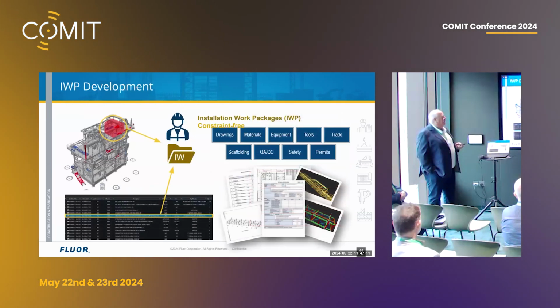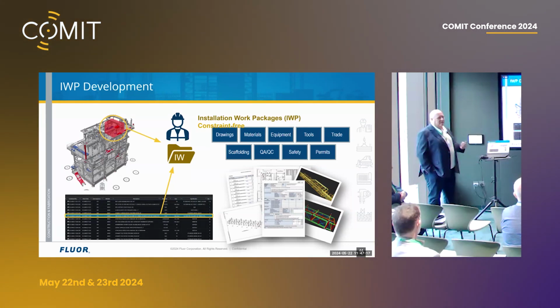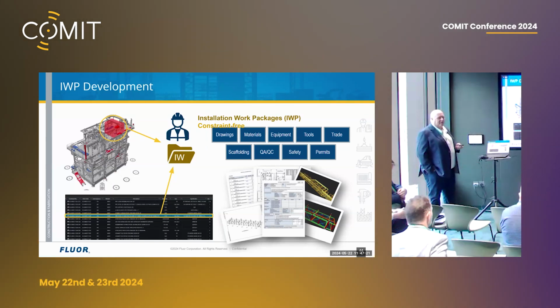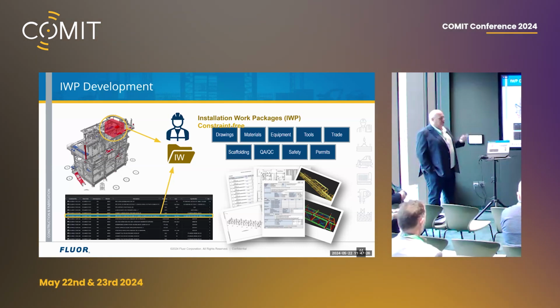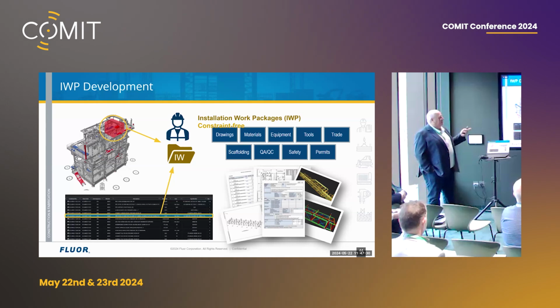And then when we go through development, we're looking at constraint-free, problem-free IWPs. What will the crew need to build this? So they don't have to run back to an office. They don't have to leave site and be unsafe. And we've identified drawings, materials, equipment, tools, the trade, actual workers, scaffolding, QA/QC, safety.